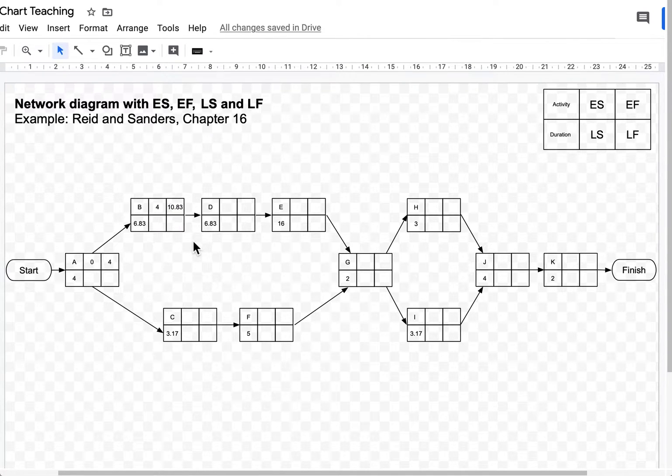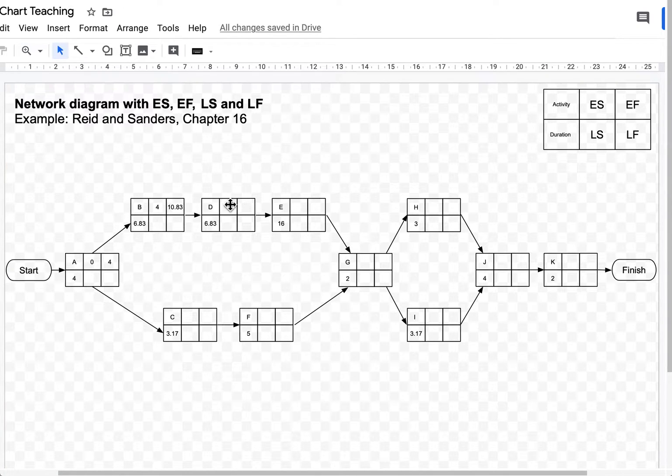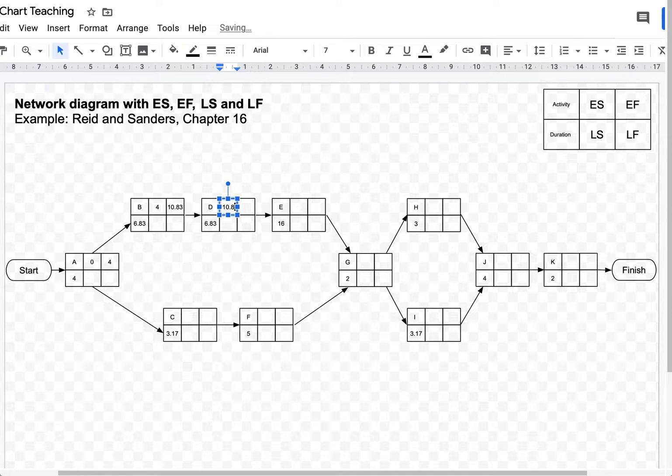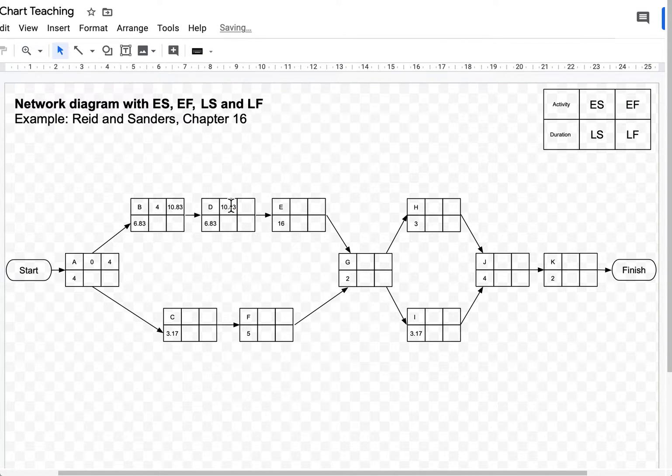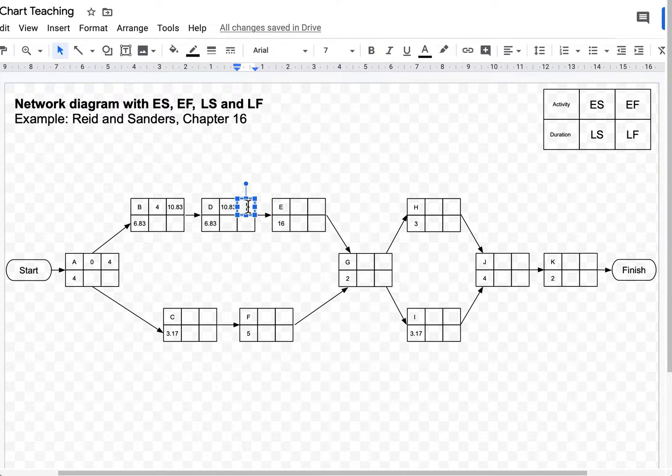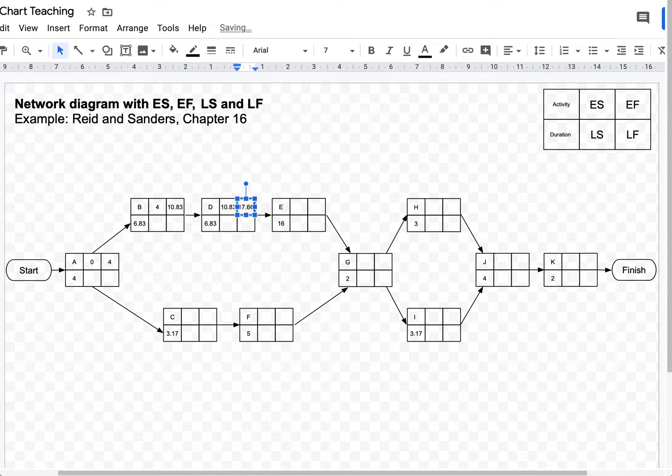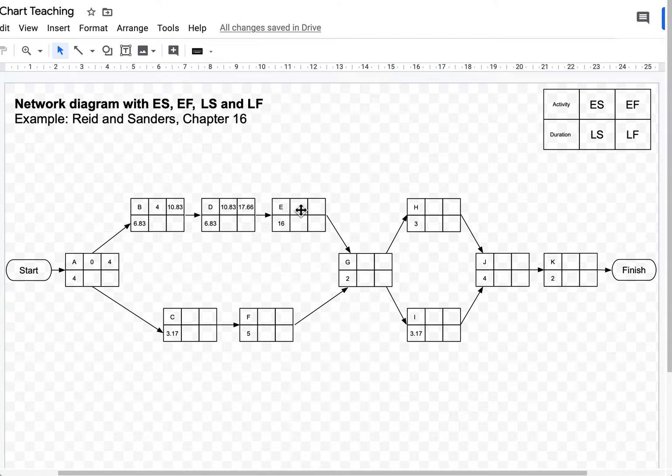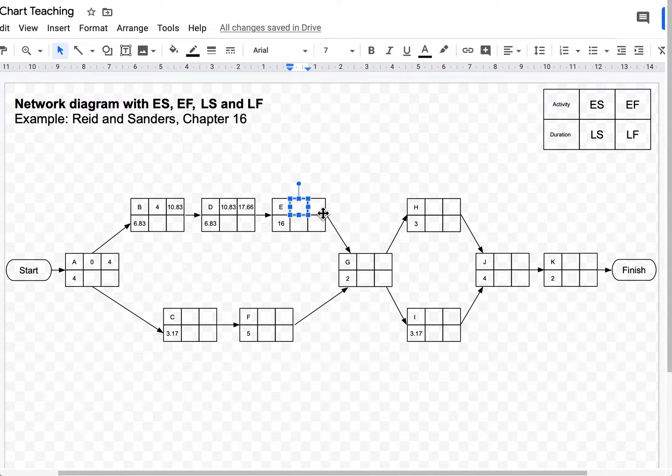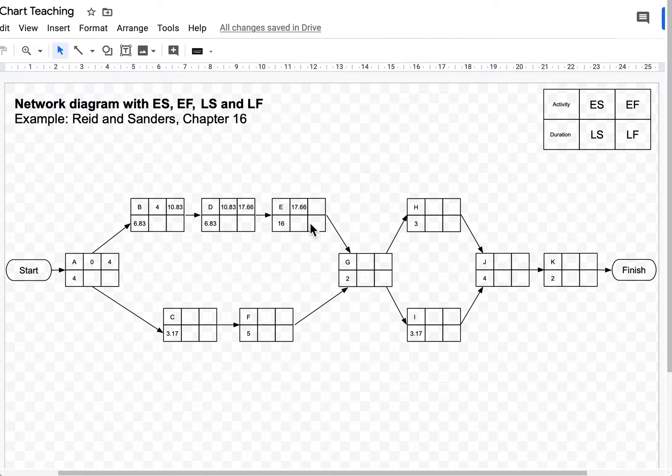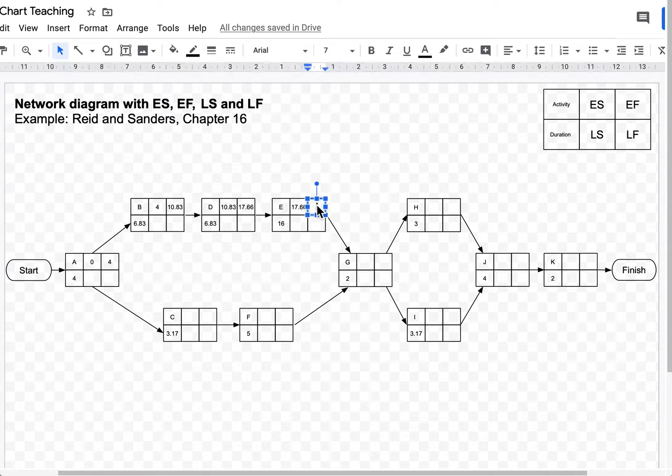I think you guessed by now what I'm going to do next. I'm going to take this earliest finish time and make it the earliest start time of the next activity. So 10.83 goes there. 10.83 plus 6.83 is 17.66. I'm going to get the 17.66 and insert it as the earliest start time for activity E. 17.66 plus 16, that's 33.66.